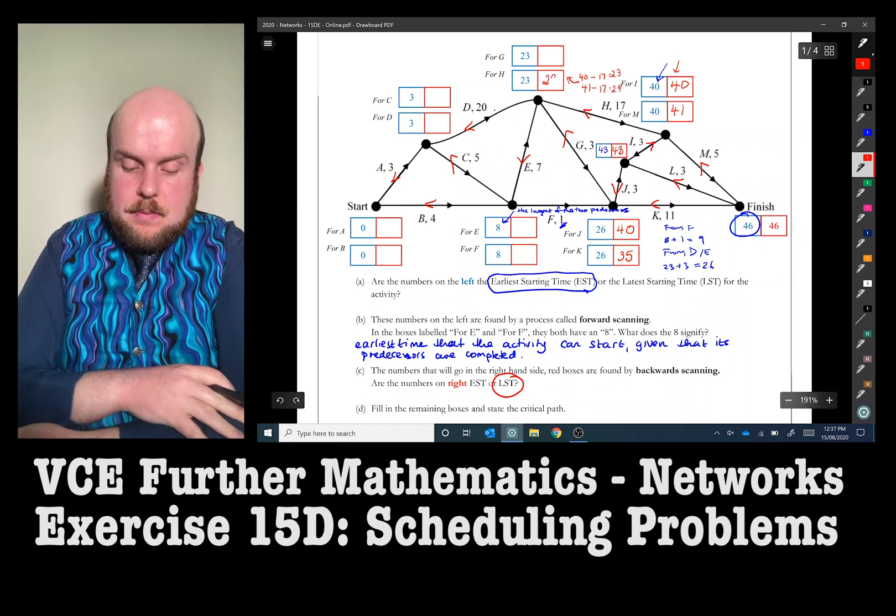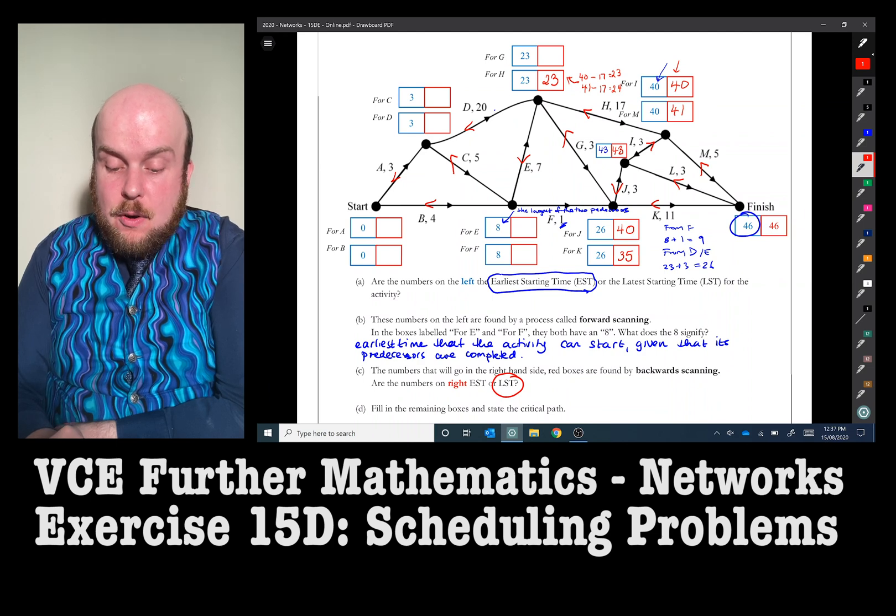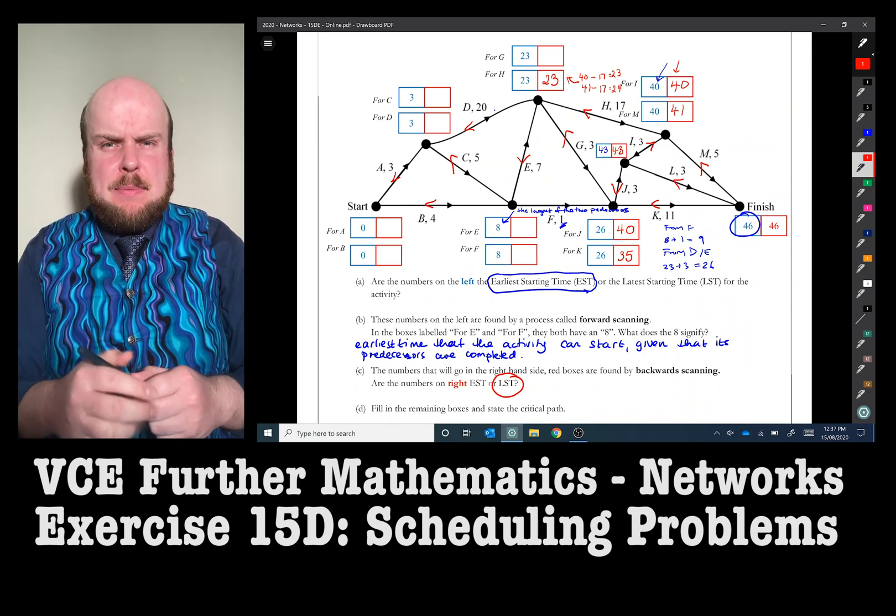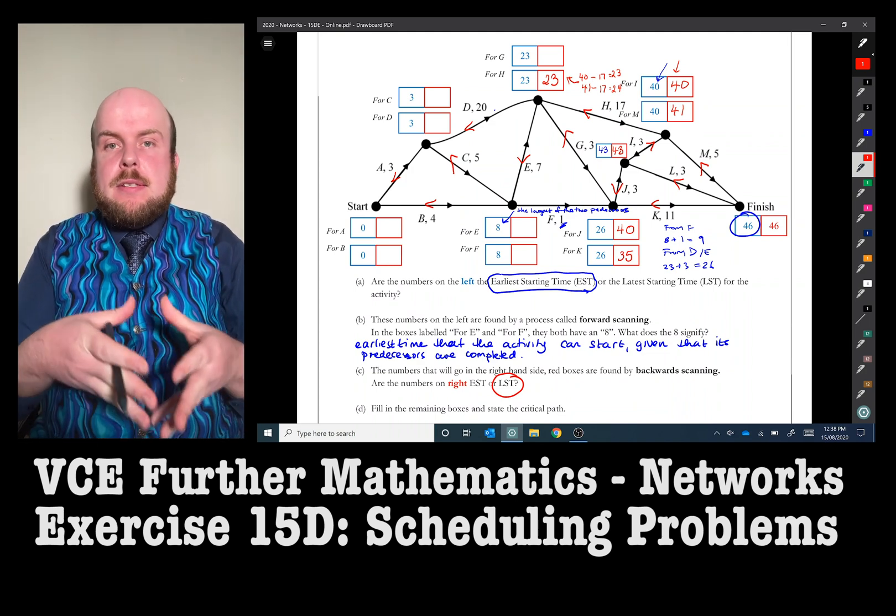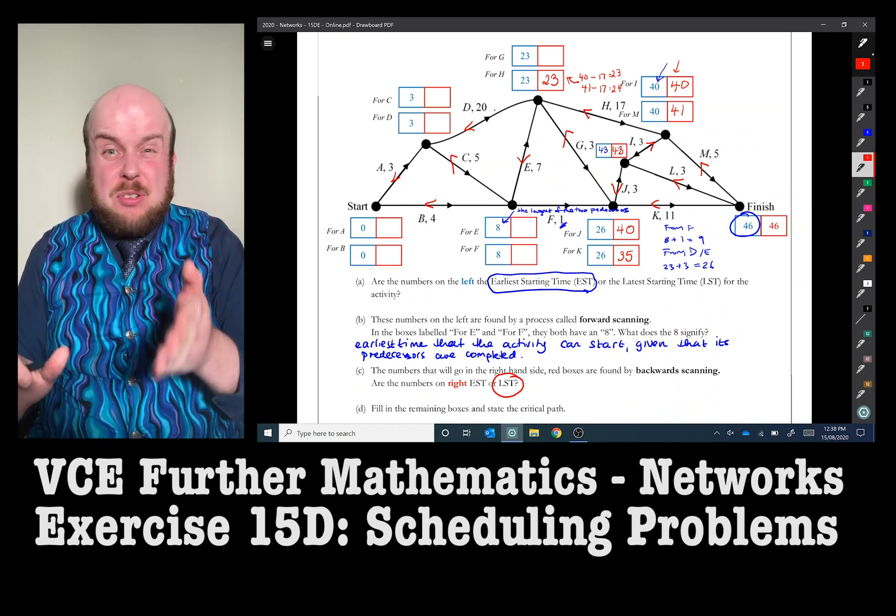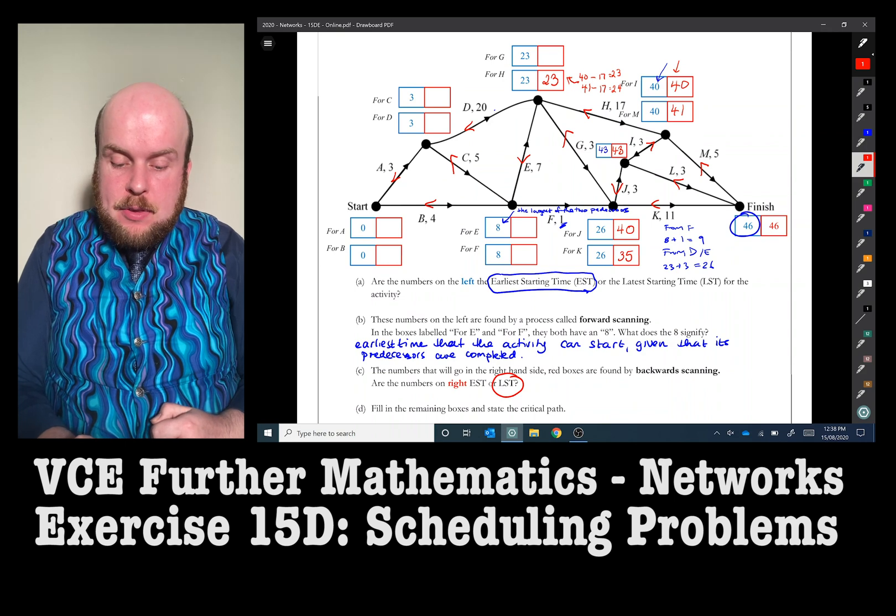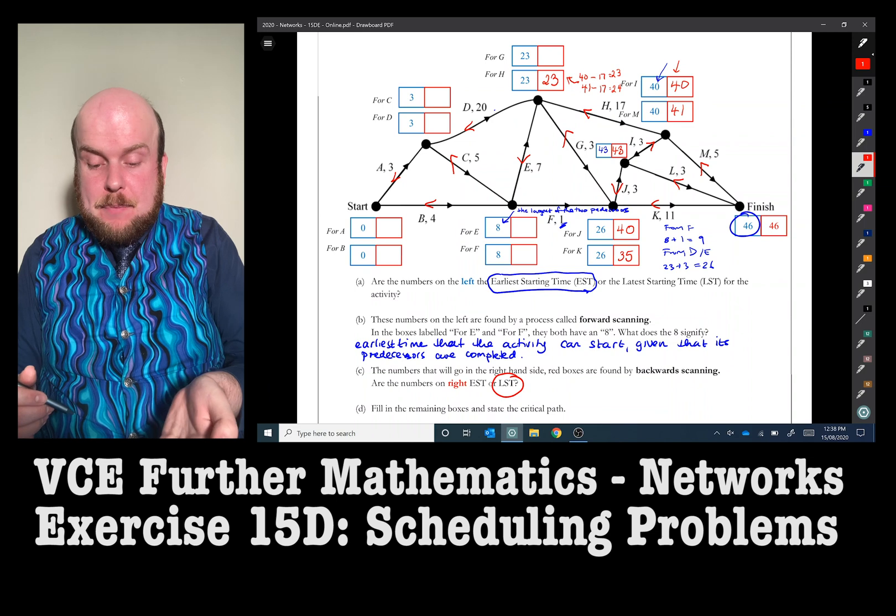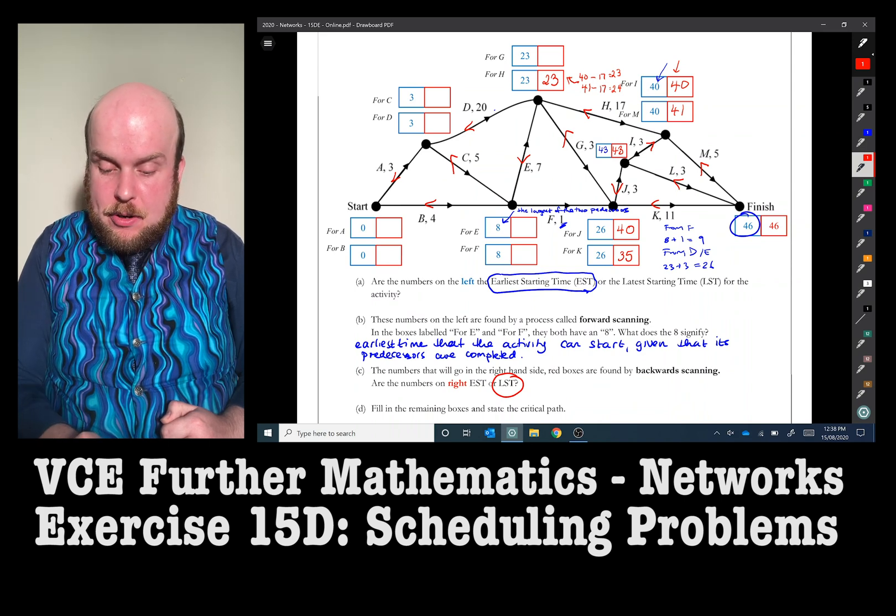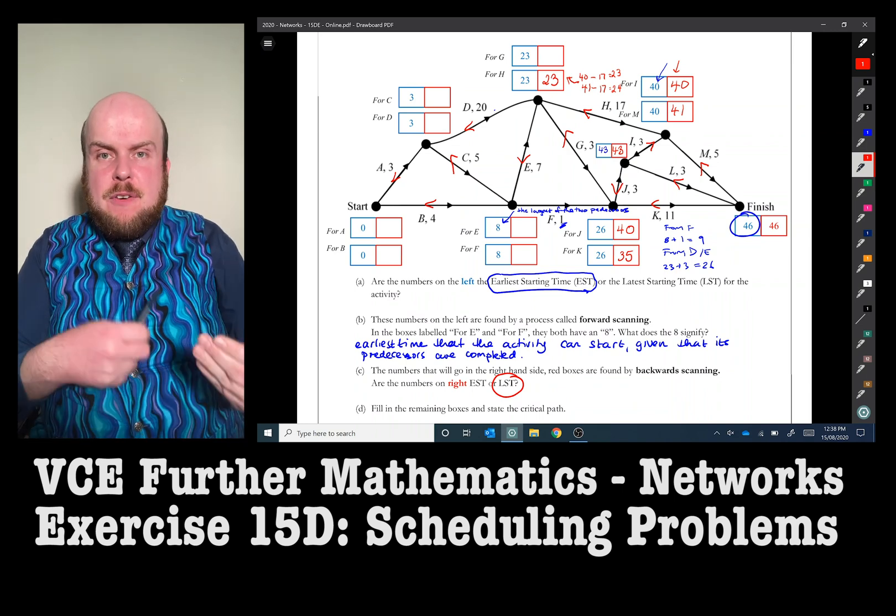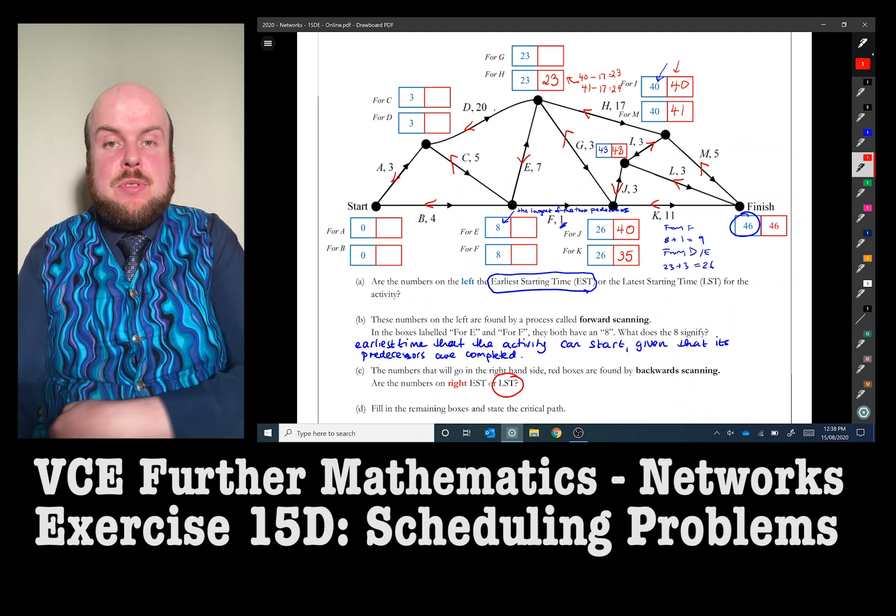So via H we had the choice of either doing 40 take away 17 gets me 23 or 41 take away 17 equals 24. Well, and we choose the smallest number. So why do we choose the smallest number? Well, remember what I was saying about delays. So the later starting time means this is the time I can start it without delaying the project. It's not the earliest time, but if I had some slack time up my sleeve, when can I get this started? Now, if I went with 41 take away 17, 24, that means actually I'd end up stuffing up the project because with, if I wanted to get the activity from, if I don't start it at hour 23, that would delay activity I and so on. And that would stuff up the entire project. So that's why we choose the smallest numbers.